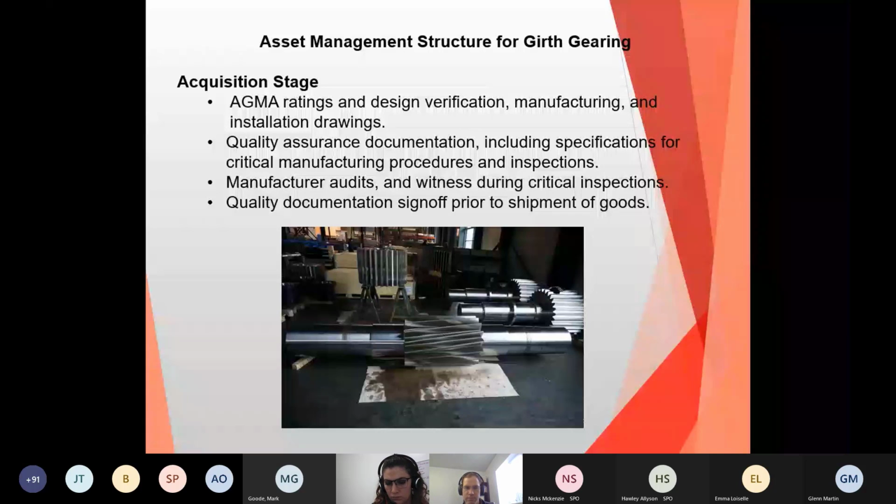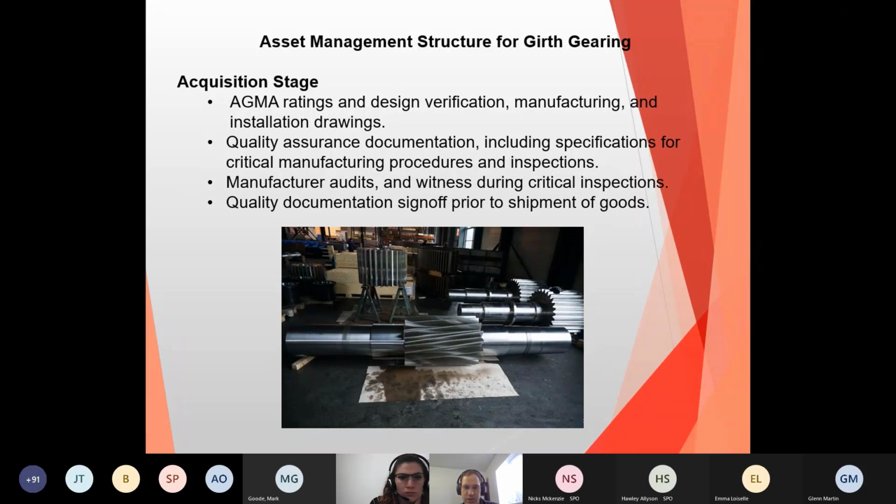And where you can fall into traps is this scenario where no specifications have been set during that procurement stage, and then it comes time to ship something and there are quality issues. The manufacturer is going to get uptight, pointing out that there were no procurement specifications included.